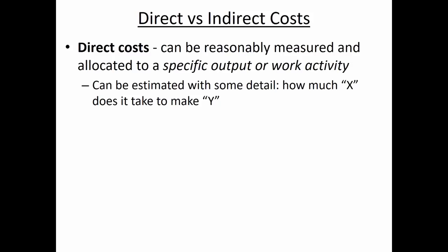By contrast, consider getting bids for a concrete driveway. Some contractors just look at it and say $25,000. The contractor I chose got out a tape measure, measured the width and length, looked at the existing subgrade to determine if the gravel base could be reused, and thought through where all the used asphalt would go. The one who thought through each component with more precision was the one I chose, because I had the most confidence that the estimate was reasonable and they were planning ahead.